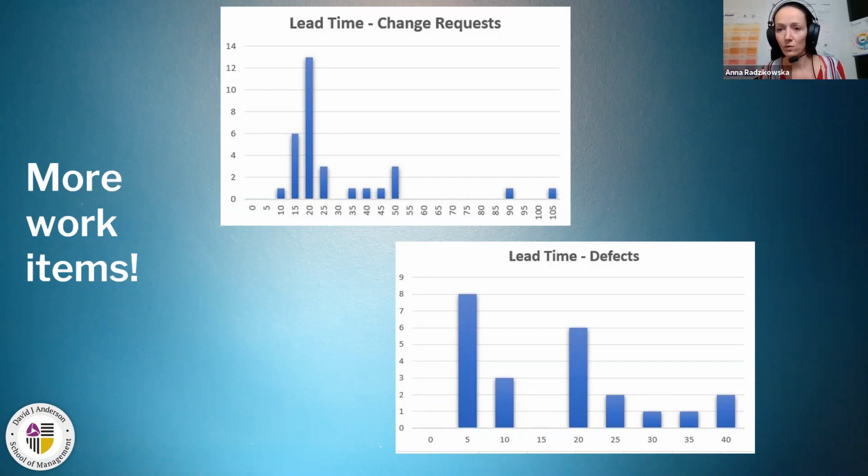So we have now more or less 10 days because the next deployment had to be approved 3 days before deployment. So we had 1 full week and half of the next week to solve it and to test it.